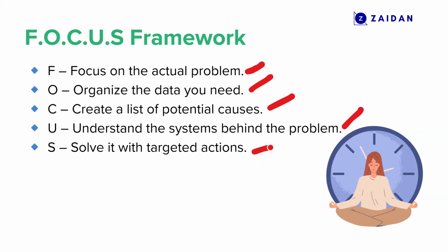Now, S stands for solve it with targeted actions. Finally, develop specific actionable solutions tailored to the root causes. Now, you have to test one change at a time, monitor results, adjust as needed, and document the learnings.